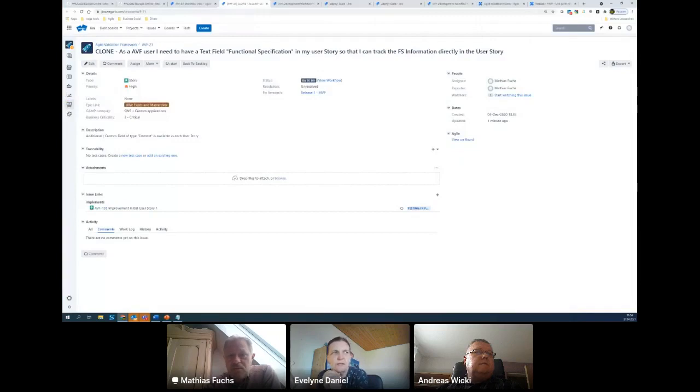So basically, if you start a project and you have never worked in such a way, this planning phase may be a little bit longer, because you need to implement the tool, you need to describe the processes, you will create your validation plan, you will do the supplier assessment. Then from release to release, this planning phase may become shorter because you may just have to fine-tune your processes, do some kind of looping back of the experience, maybe update your validation planning because you saw some missing elements. But this planning phase will be shorter.